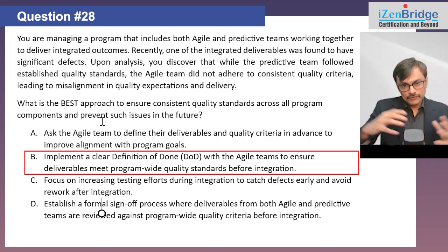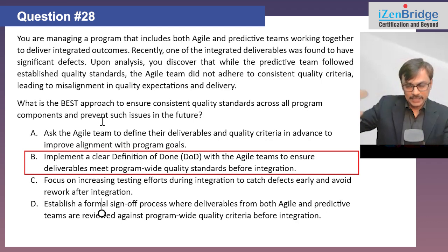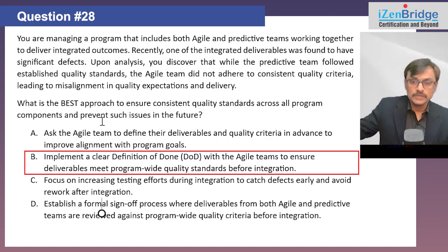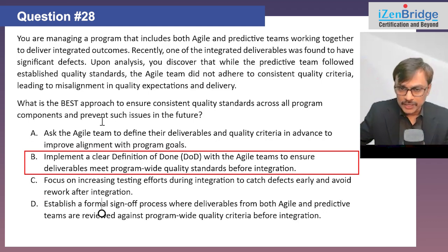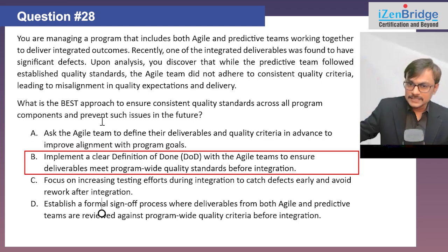And then we also create an increment level, deliverable level, completion understanding, which ensures that when we mark a particular user story complete or set of user stories complete, they should meet those agreement of those defined internal quality requirements. So internal quality requirements ensuring that we have a common understanding of completeness of our work is called definition of done, and it is applied on top of your acceptance criteria. On top of it ensures all the stories or all the work items are meeting that particular thing.